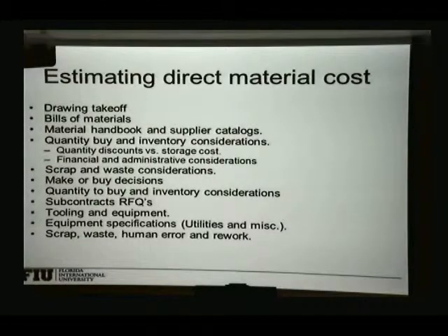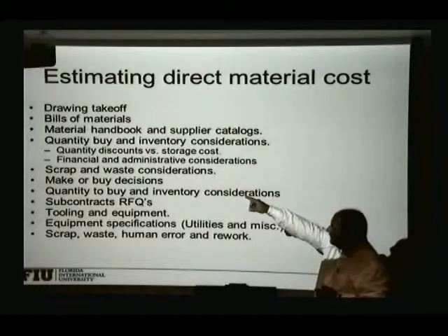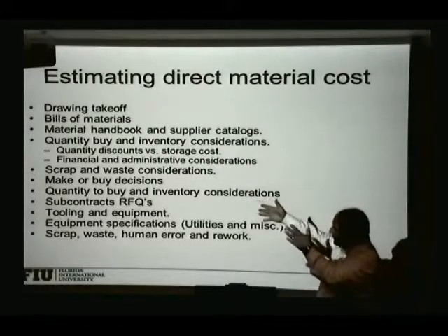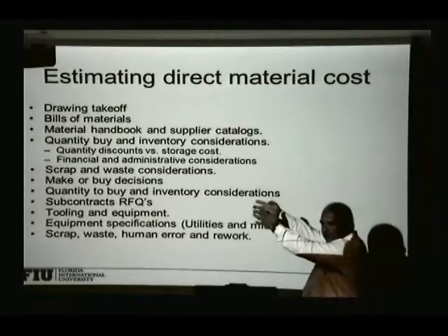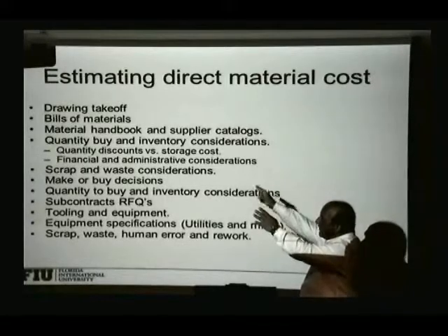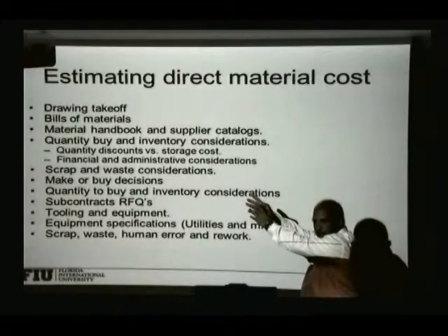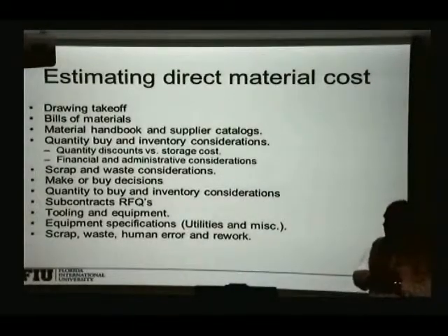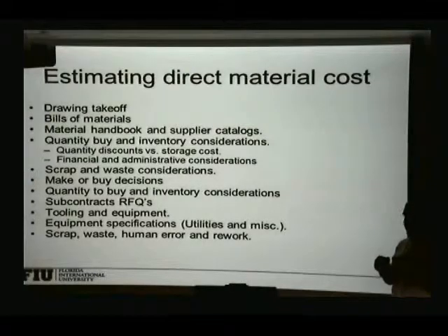Like, for example, let's suppose you're setting up this ceiling here, right? So in that corner, you see that the square is smaller than in the center because it doesn't completely fit the exact size. So you have to cut a section of a tile to fit that corner, right? So then, if you start counting what area we have here, and you divide that by 2 by 2, which is the area of these tiles, guess what?